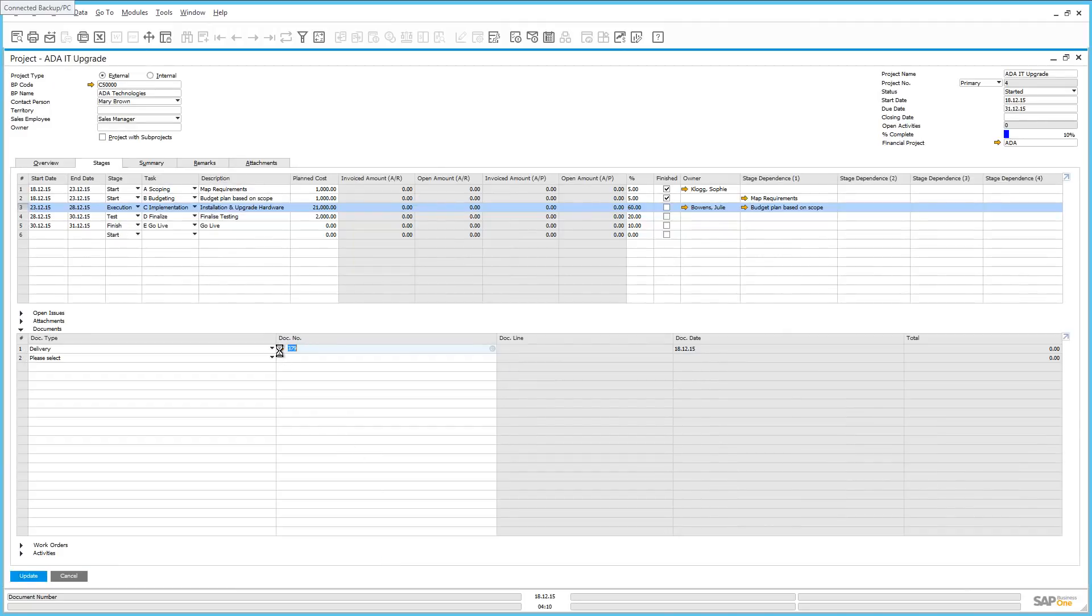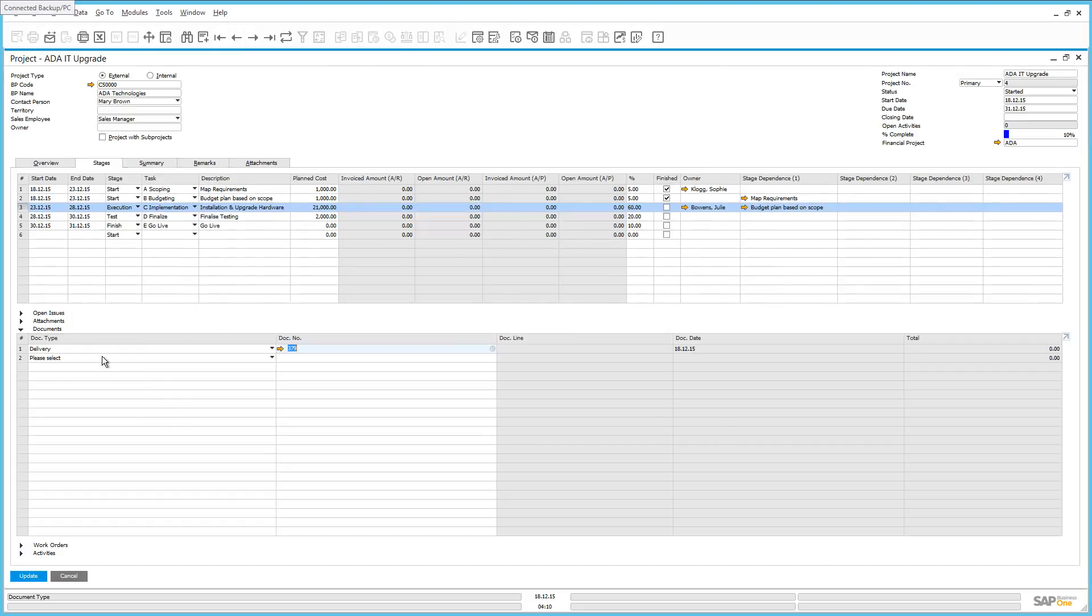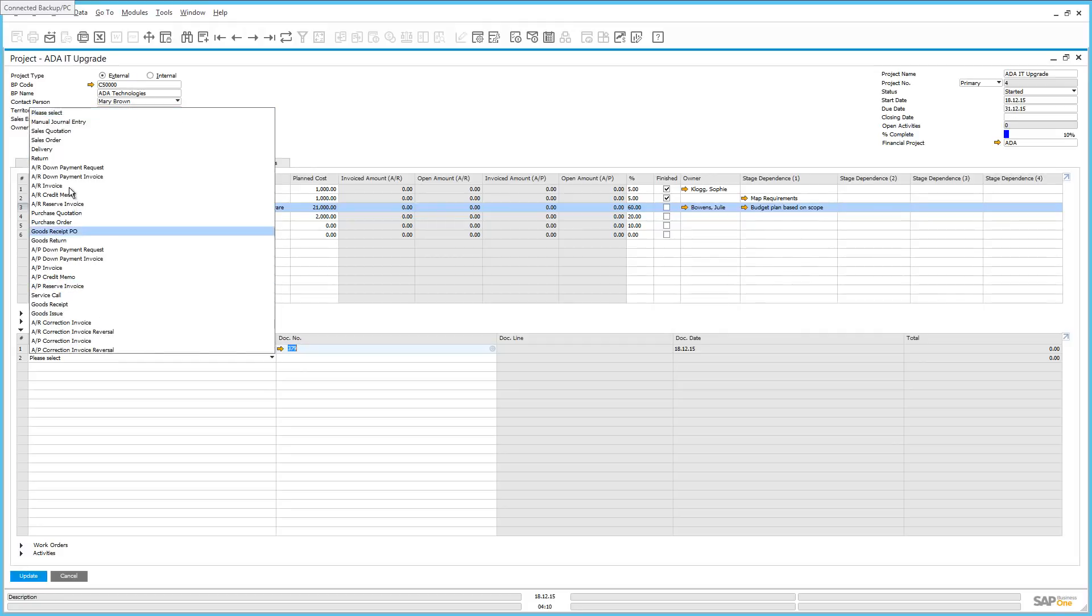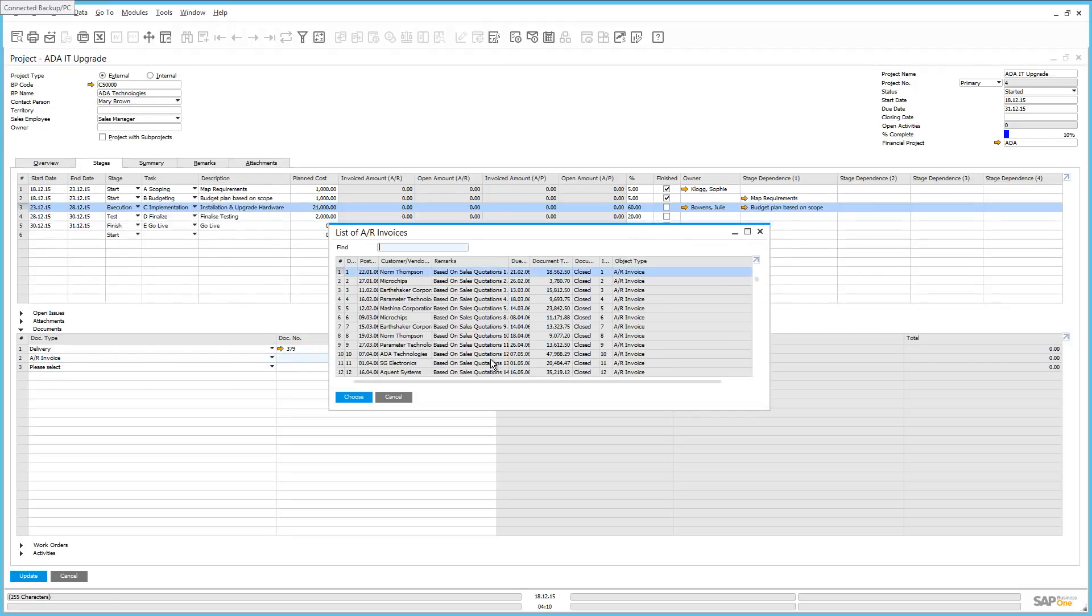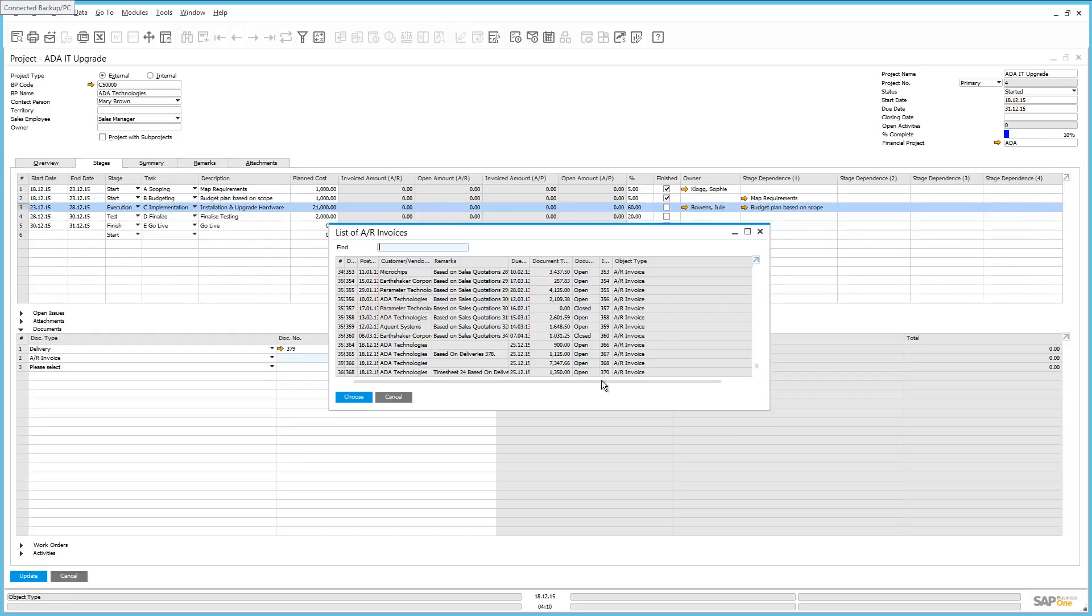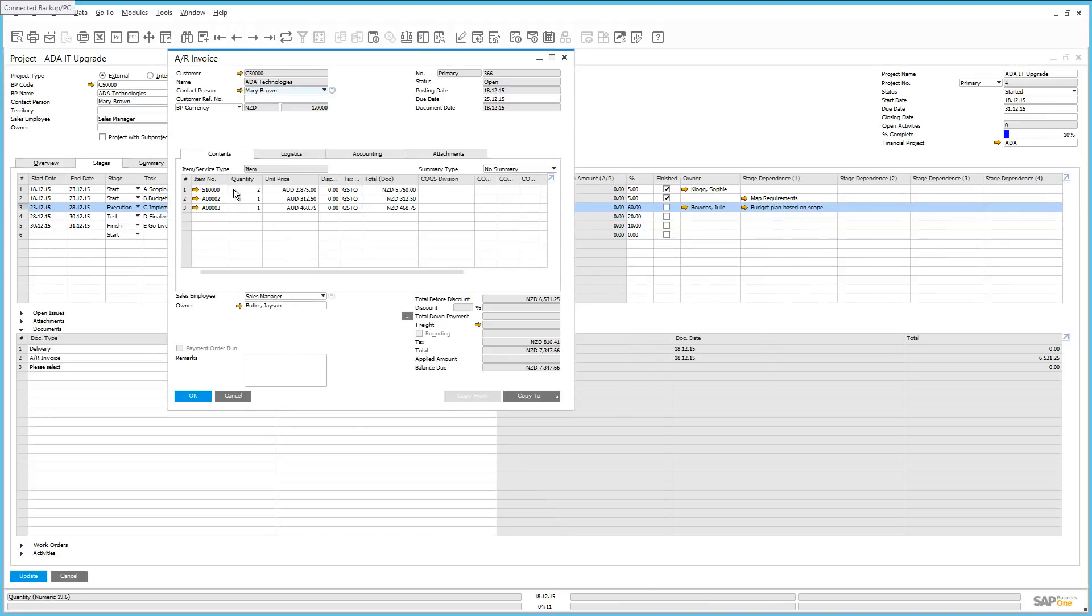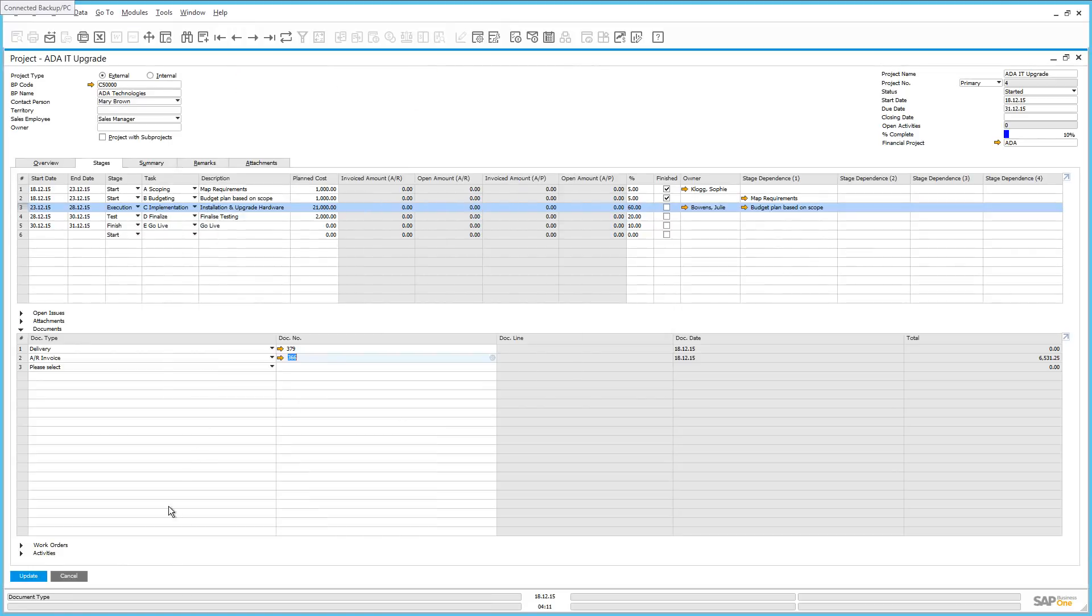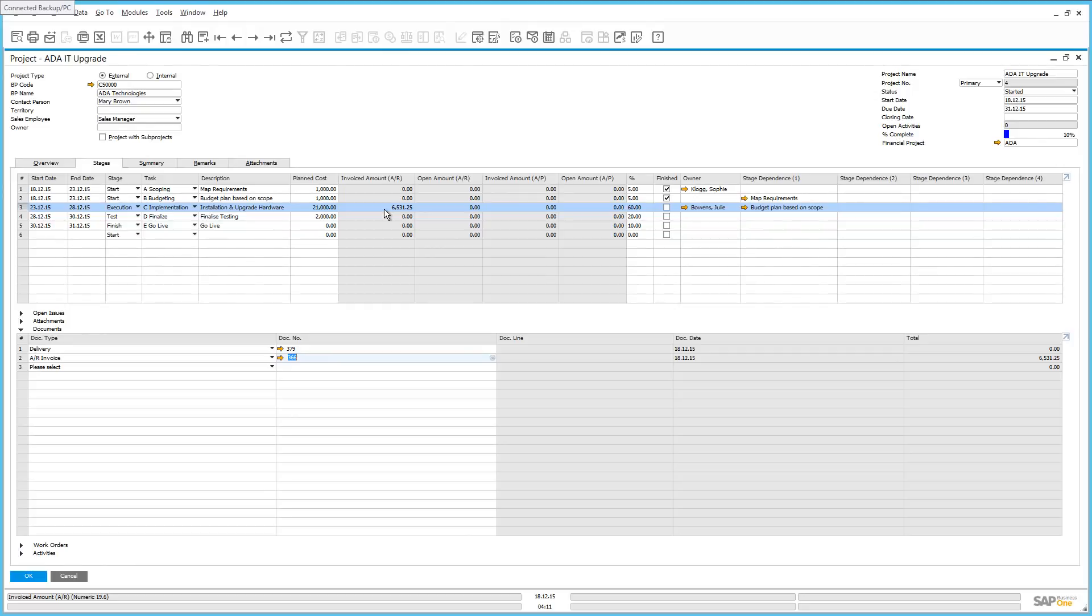If we drill down to the delivery document, we can see that this delivery document includes the number of labour hours that Julie has worked, which is 10. And so this cost will then be attributed to this project. In addition, we've also sold two servers and two printers to the customer for this project, so we're going to include that invoice as well. As you can see, when we drill down to the invoice, you have two servers and two printers listed here under the AR invoice for this project implementation. Let's now update the project window. What you can see here now is that we have a running total of the invoiced amount and any open amounts outstanding. And what this means is you can, at any point in time, be able to view the invoice and opened amounts at a row level from within the project window.